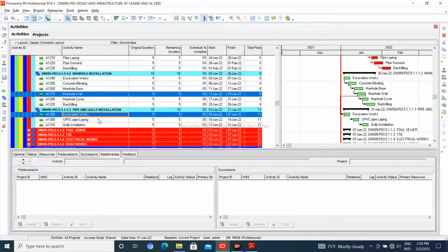There is not enough position to install the manhole. So at least you need a space to erect the manhole, and the position of the crane must be considered, because otherwise if you do the excavation, there will be no space for the crane to erect the manhole. You got it? It's clear, right? Yes, exactly.